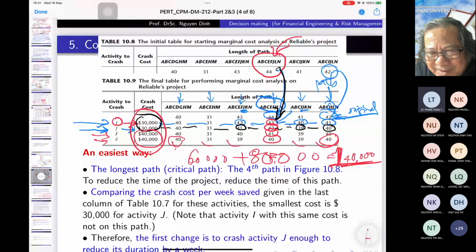No, it's not. It's not worth doing this, because when we reach 40, we have to pay a lot of money, and among the bonus we just get $10,000. Not worth doing that. One reason for not worth doing that is what? One reason is the bonus is very little, $10,000 among the 4 billion or something like this. But still, there is another reason. What is it?